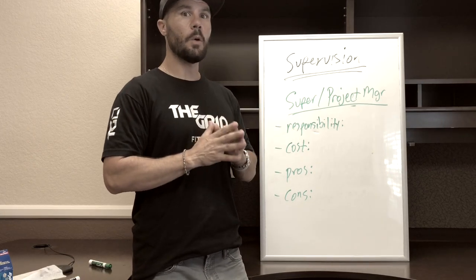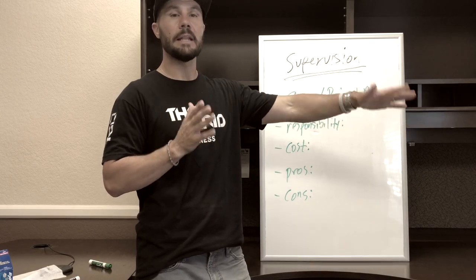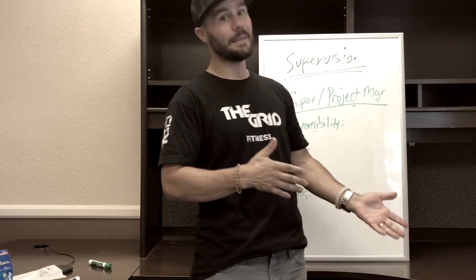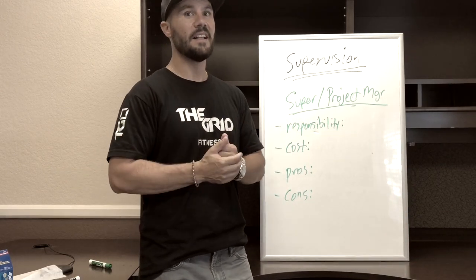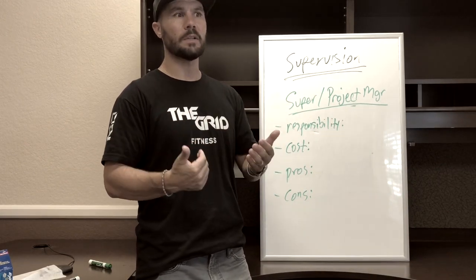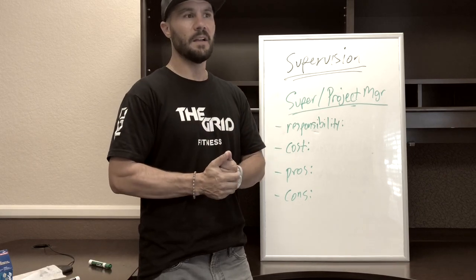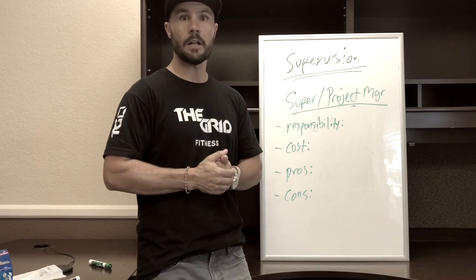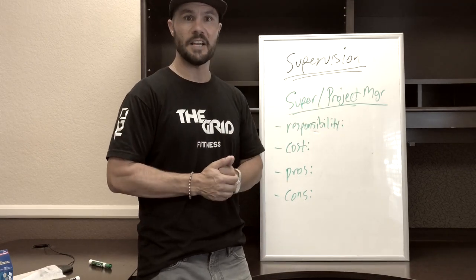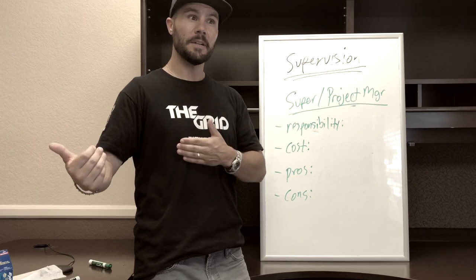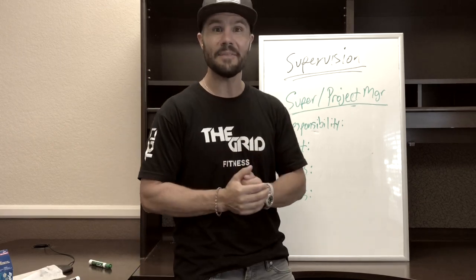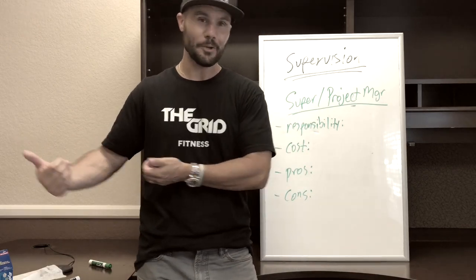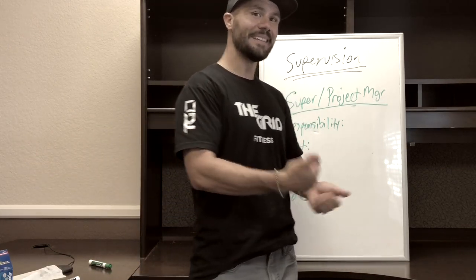But you do not want to just turn your supervisor loose and not manage them very well. They will milk out a project, or the tendency, I'm talking the downside now, the cons. If they're getting paid hourly or on a weekly salary, one of our fast trackers put their supervisor on a $1,000 a week salary to manage a couple different projects. Well, that sounds great in theory, but what motivation do they have to come in on budget and to get it done quickly? The longer it takes, the more they make, the quicker it takes, the less they make. It's not a good structure.